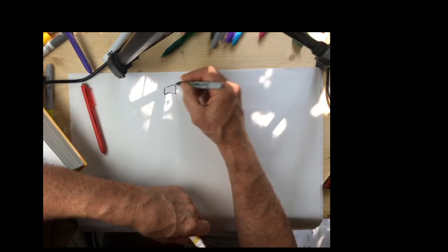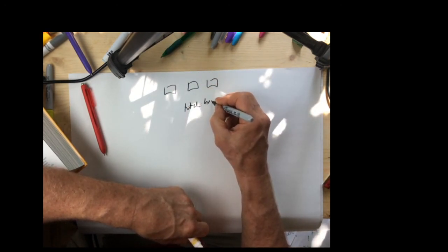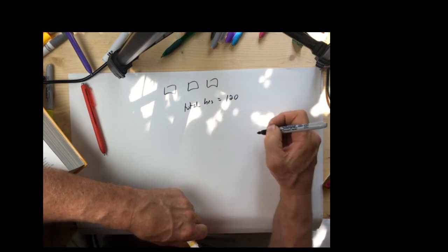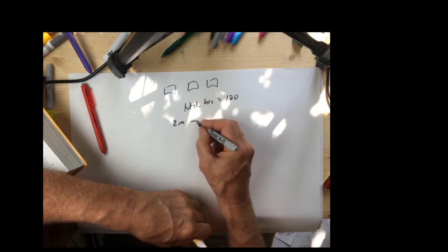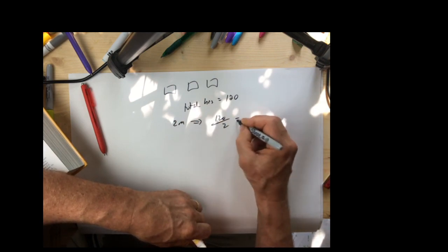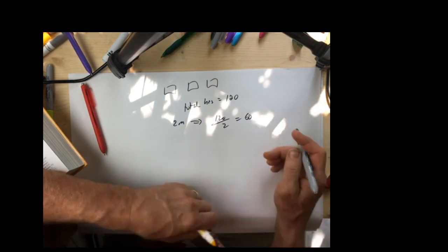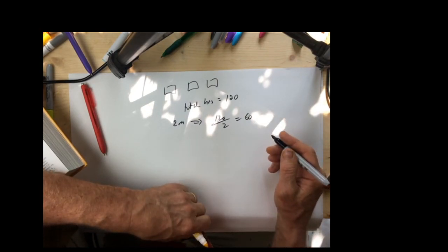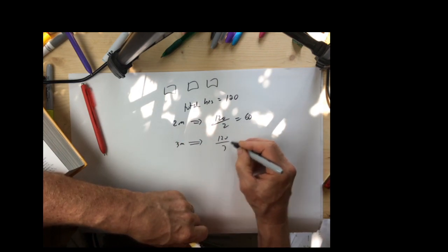Let's suppose you've got a bunch of jobs and the total hours equals 120. Well, with two machines, if you finish in 60, you're great. Nobody had any trouble. If you had three machines, 120 divided by 3 is 40.